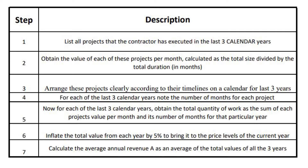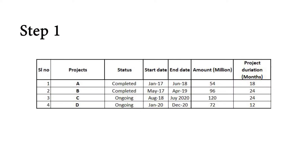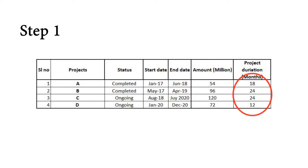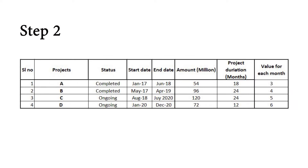Let's begin the calculation. Following will be the steps to calculate average turnover. Step 1: List all the projects the contractor has executed in the last three calendar years, both completed and ongoing, with project duration in months and start and completion dates. Let's assume we are in 2020 and the following are the projects of a contractor. Step 2: Obtain the value of these projects per month, calculated as the total amount divided by its duration.